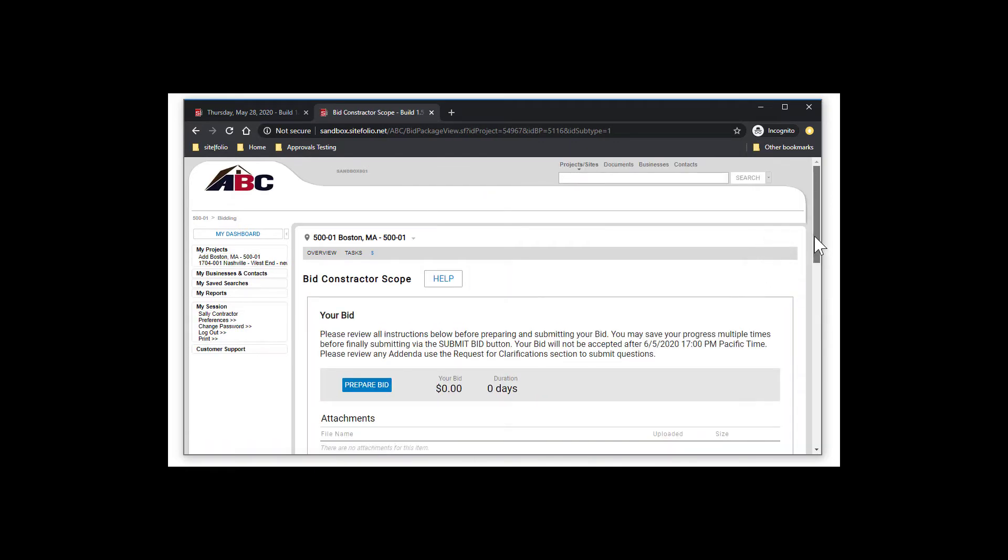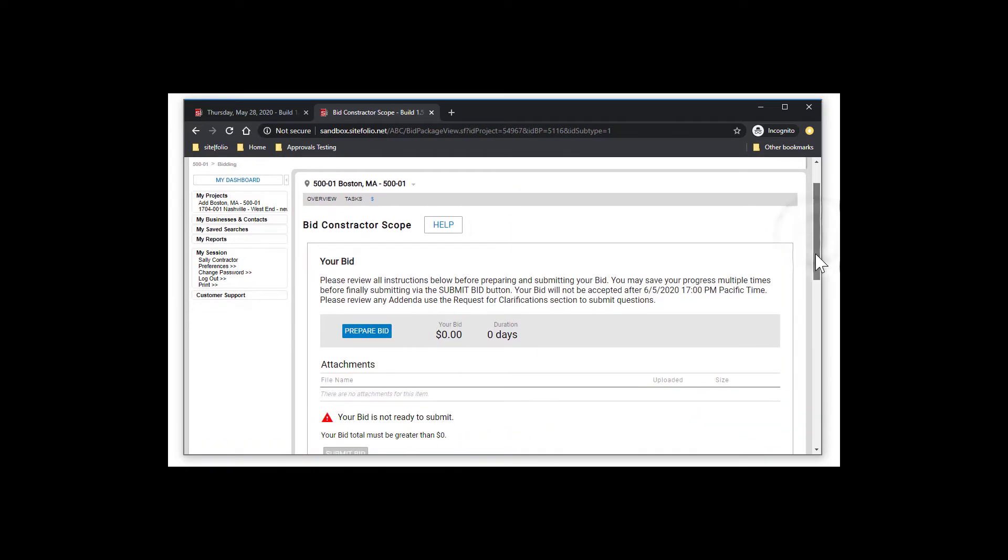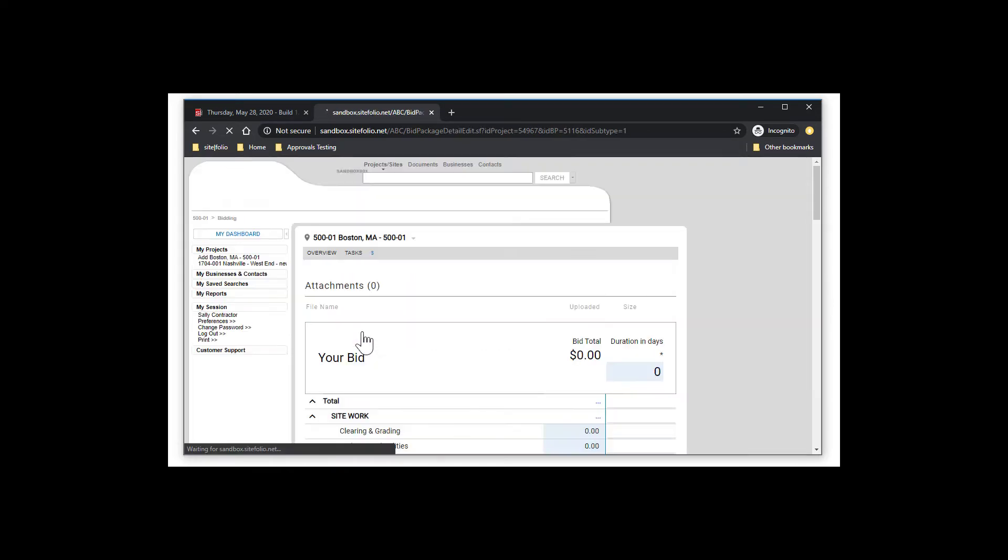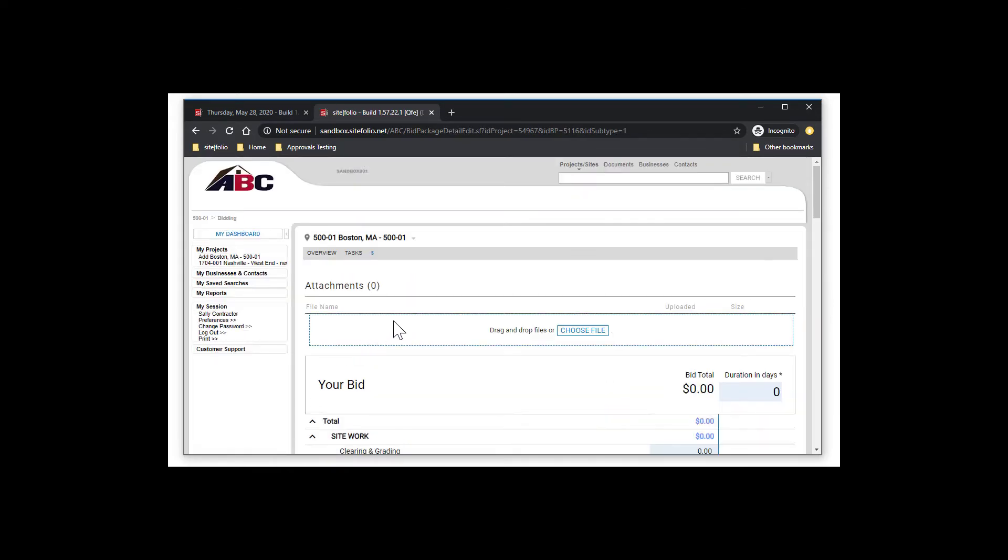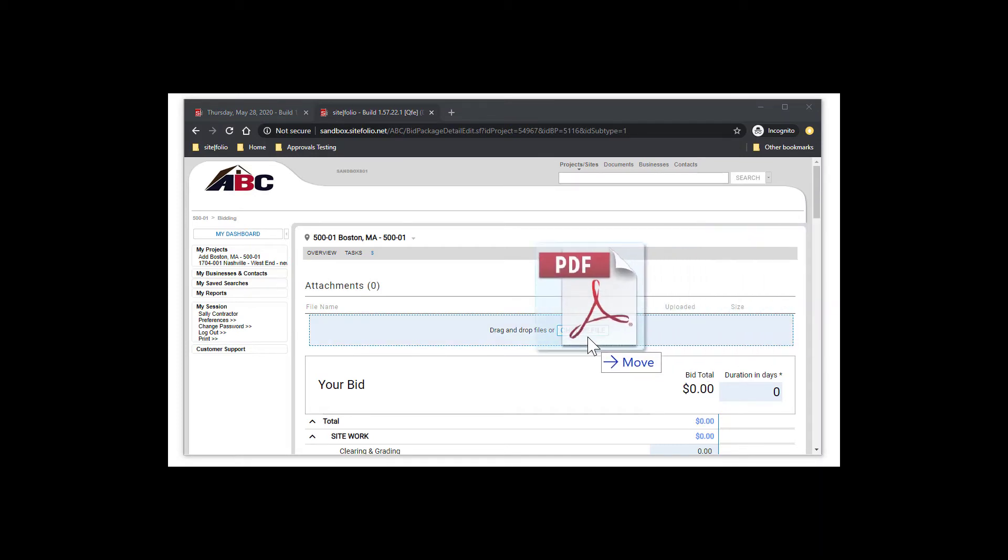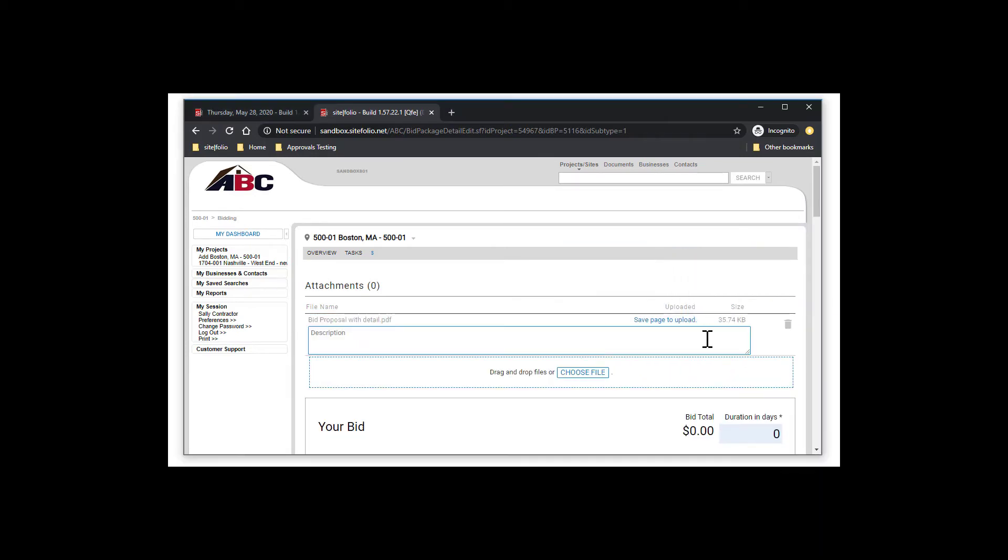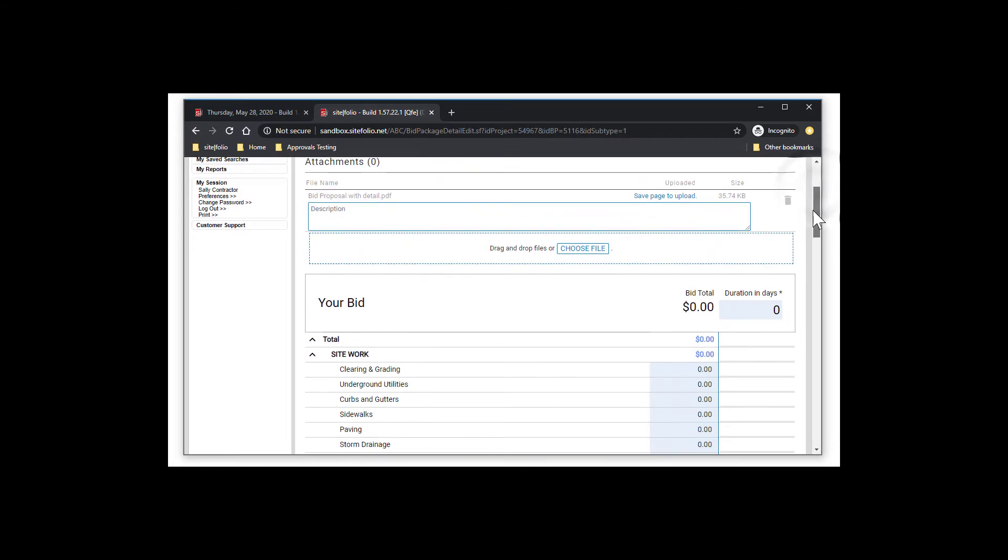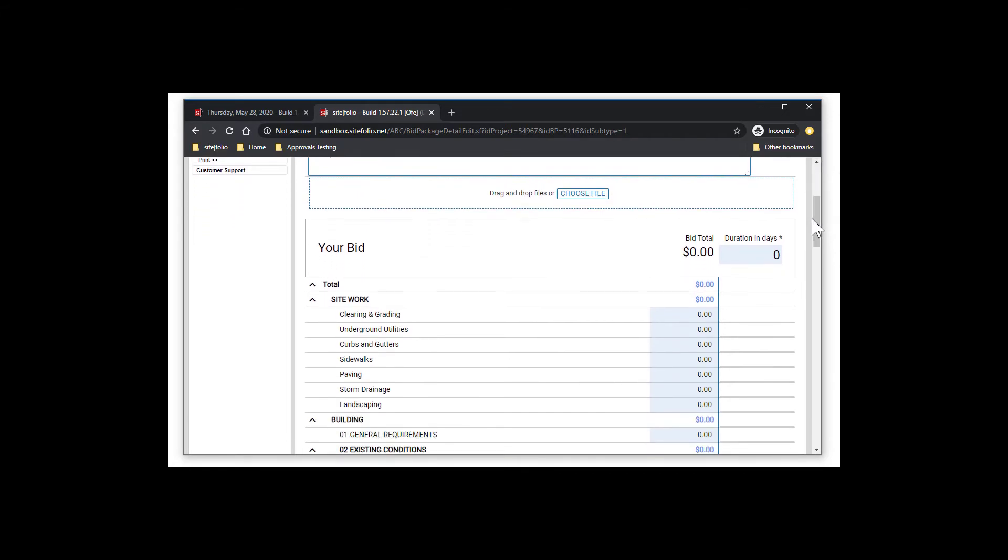Once you are ready to begin drafting your numbers, go ahead and select Prepare Bid. On this page, be sure to attach any relevant files to support your final bid numbers. This can be done at any time before you submit your bid to the client. Where it says Duration and Days, be sure to key in the number of days you expect to complete the project in.